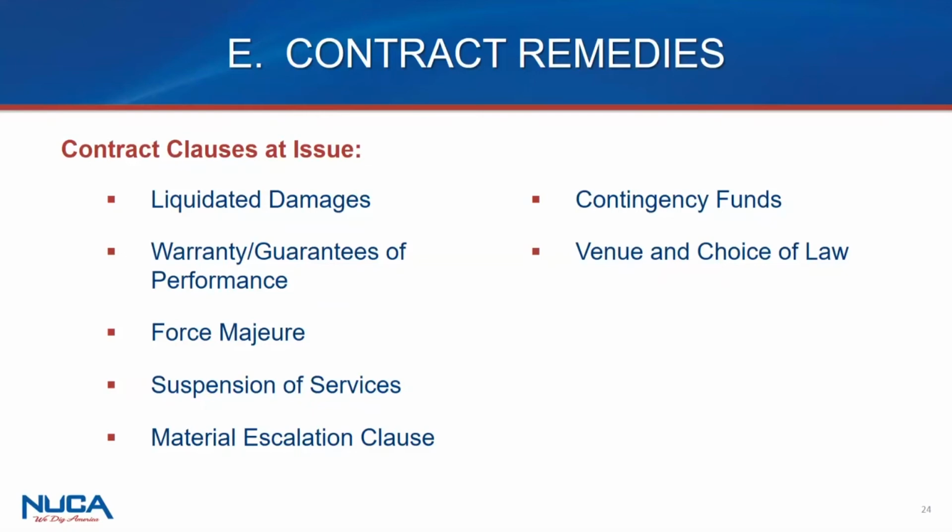A lot of prompt pay acts allow, again, if you're not being paid to suspend service, what's your contract say about suspension of service? If something gets delayed and the owner says, here's a stop work order, go home, are they going to pick it up 6-7 months from now? Are you at the same wage rates? Did people get increases? Are you union, non-union? Is that increasing? When does suspension allow you to terminate?